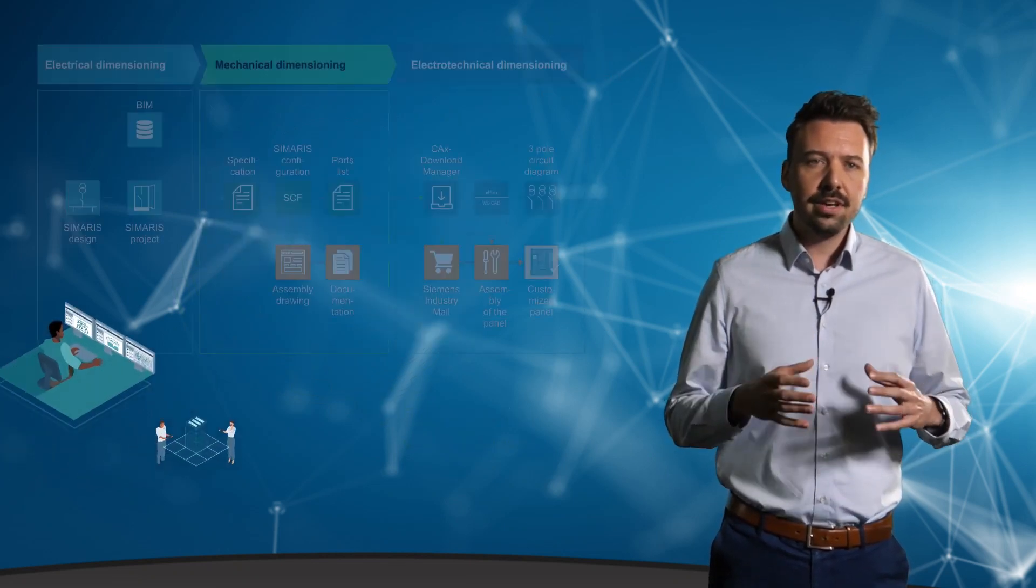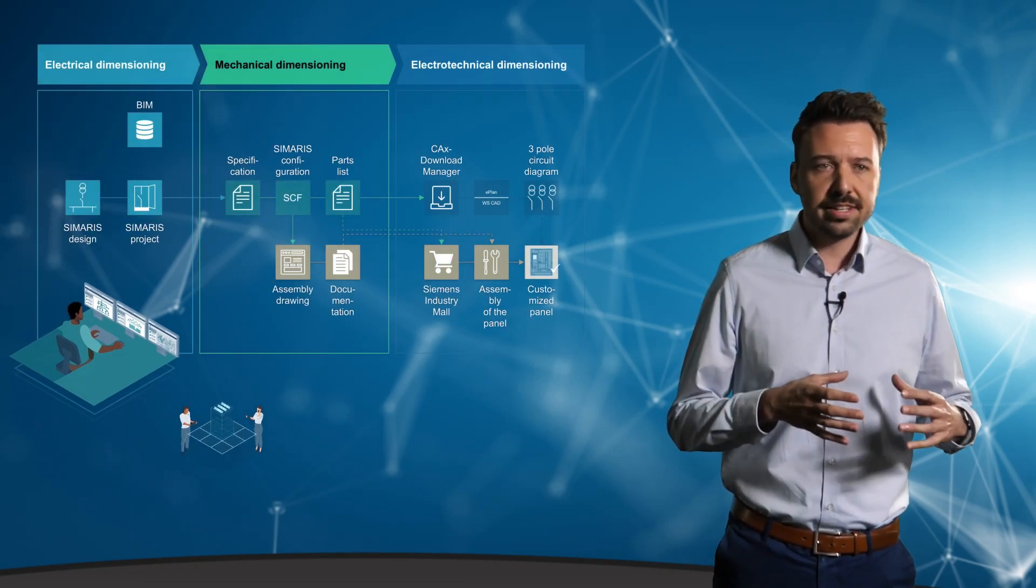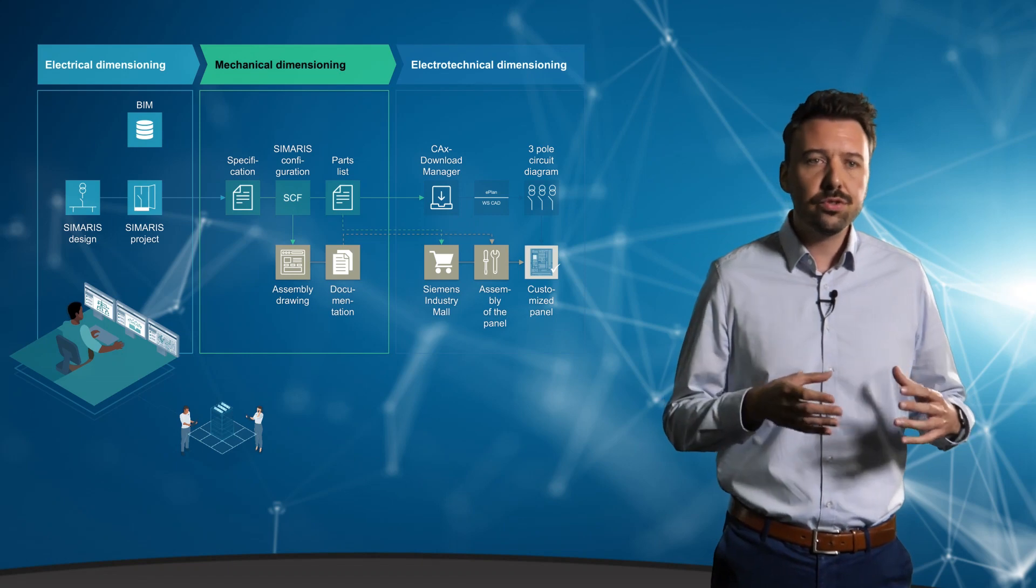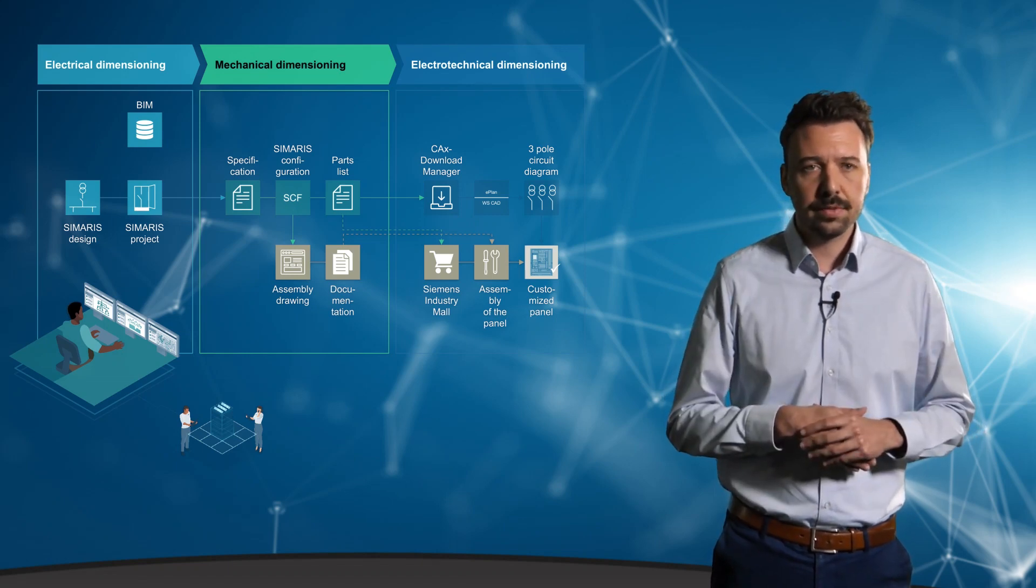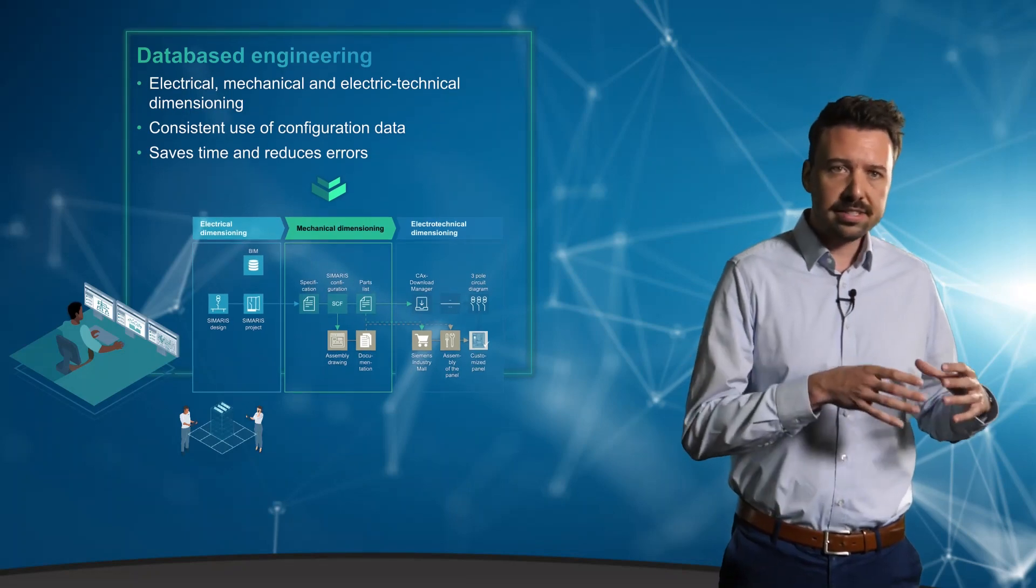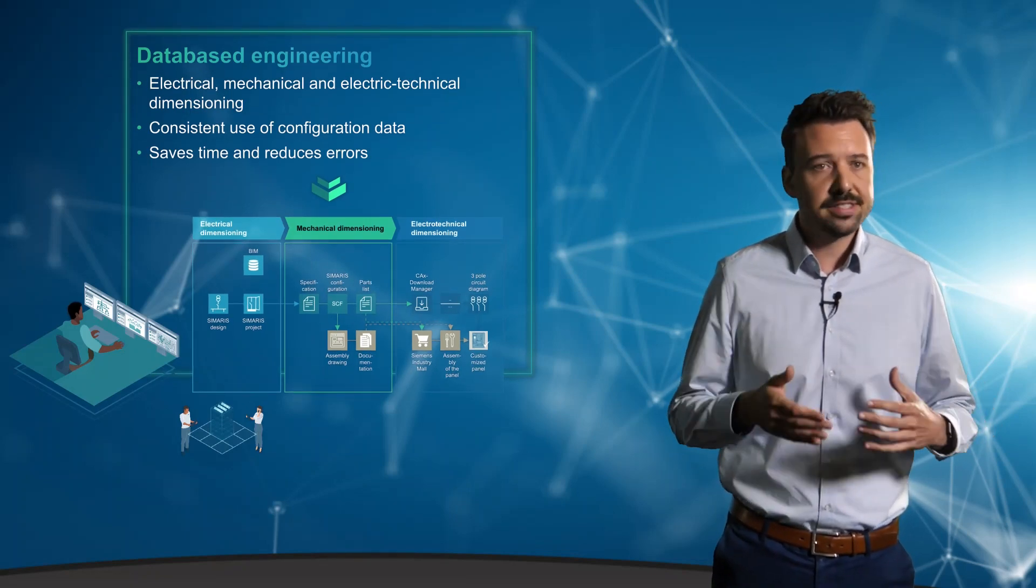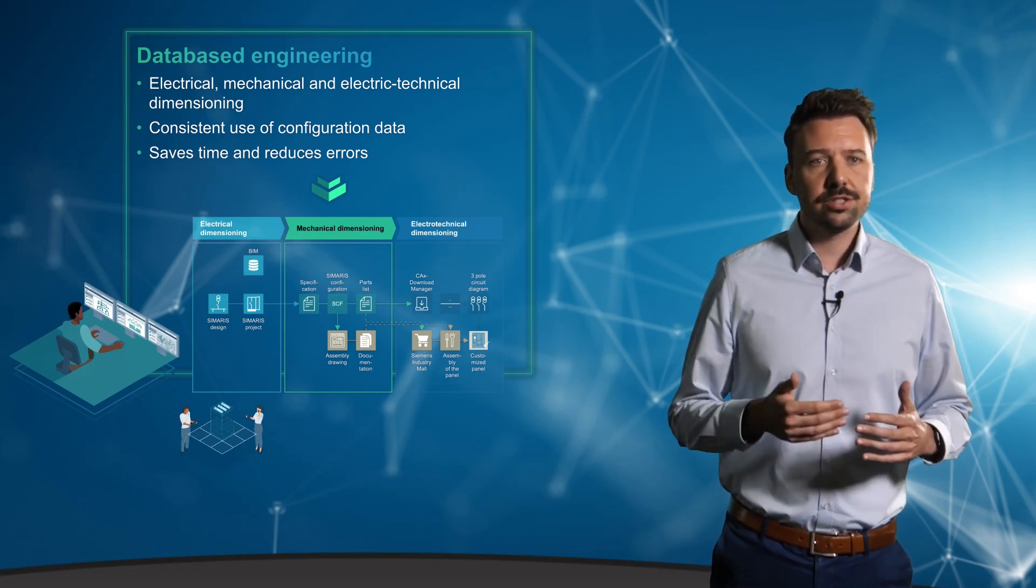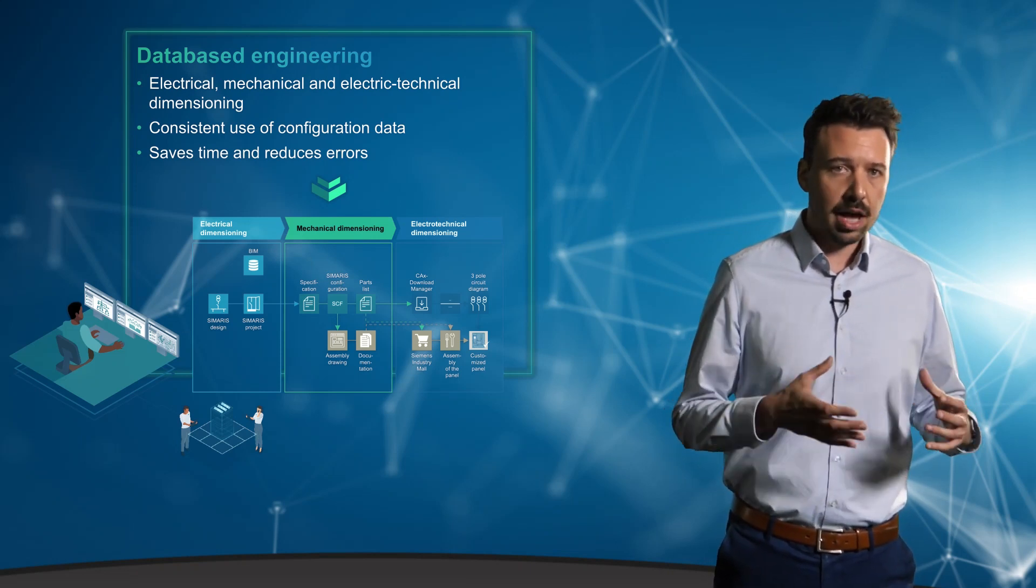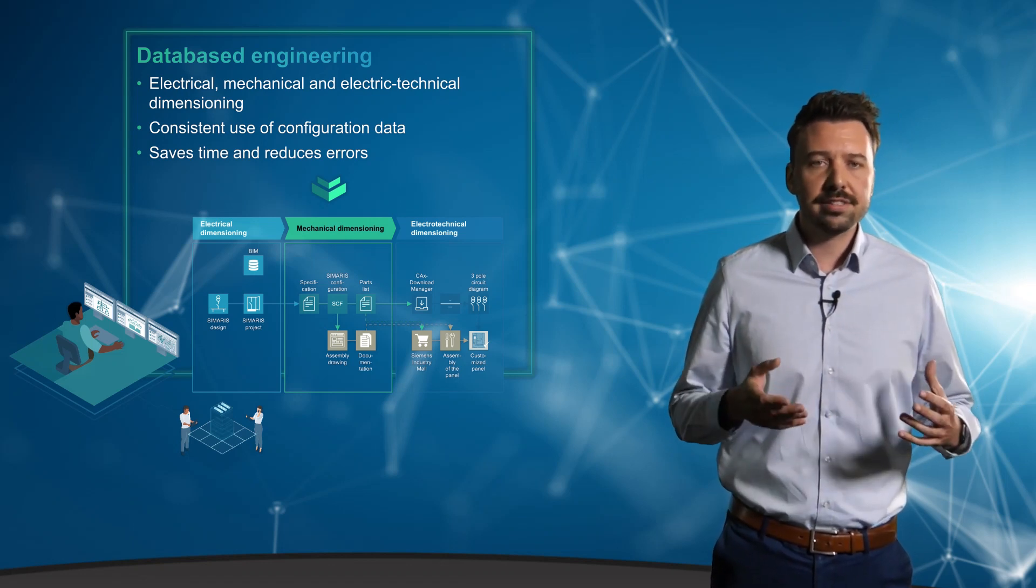As early as the planning stage, a great deal of configuration data is generated and this can be used throughout this phase right up to commissioning. For example, exports from Simaris Design can be used one-to-one for commissioning in Centron PowerConfig. The great advantage of this is of course the reduction of costs, time and above all a reduction of errors and failures.